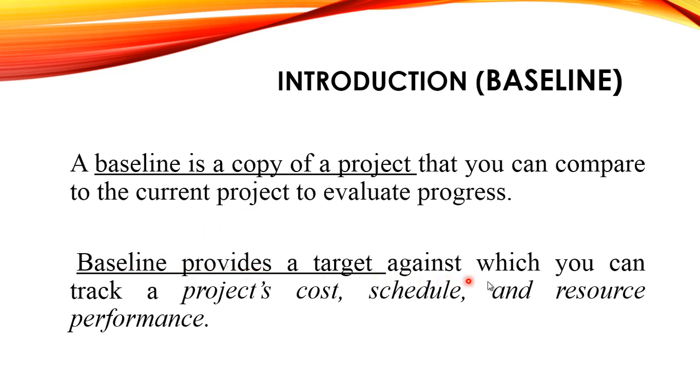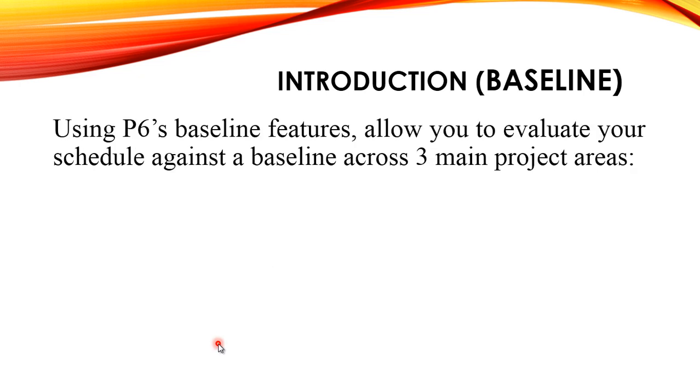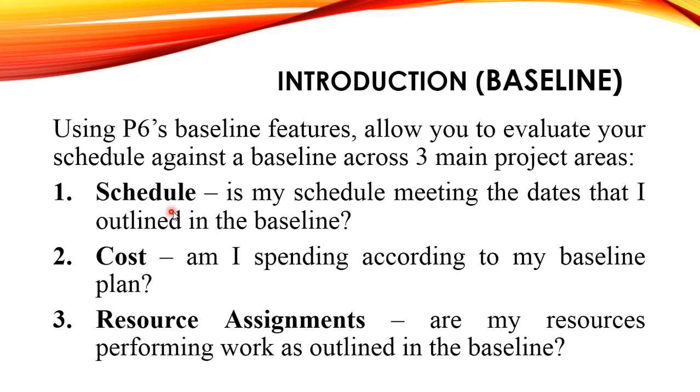Baseline provides a target against which you can track project cost, schedule and resource performance. Using P6 baseline features allows you to evaluate your schedule against a baseline across 3 main project areas. One is schedule. Is my schedule meeting the dates that I outlined in the baseline?